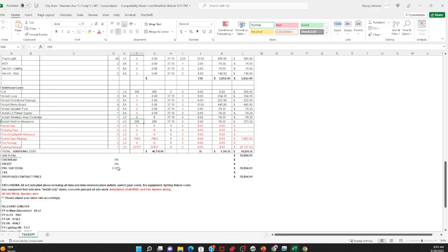But most of my clients are mom and pops that do their own work. What I recommend is a reasonable base rate, because you're making all the money. It's not like you're paying a crew. You're taking home that money. So give yourself a decent hourly rate and maybe 10 or 15%, or 20% combined overhead and profit, because you do want to be competitive. So it really depends on the business structure and how you do that.